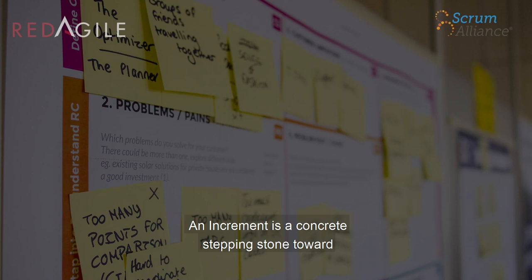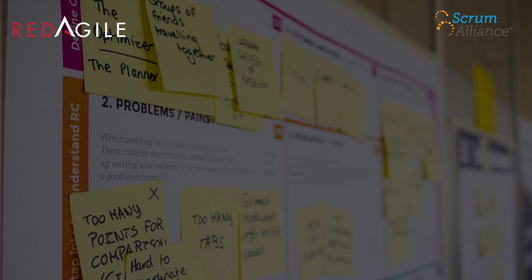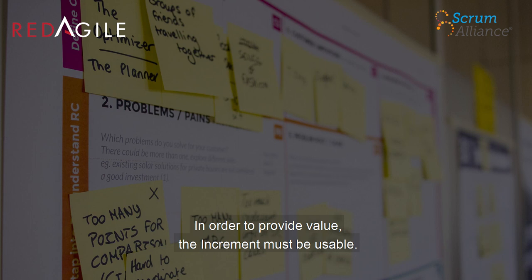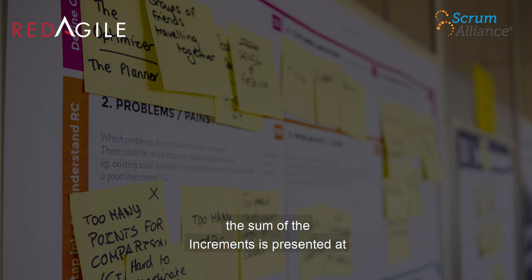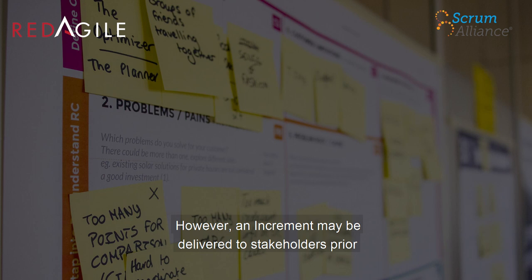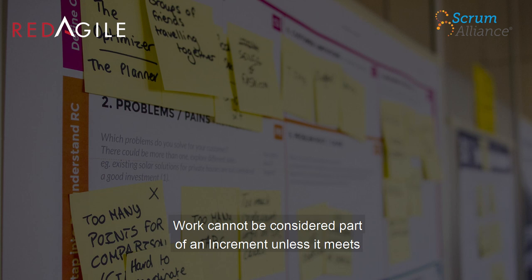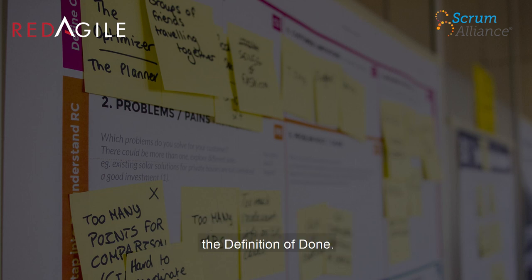Increment. An increment is a concrete stepping stone toward the product goal. Each increment is additive to all prior increments and thoroughly verified, ensuring that all increments work together. In order to provide value, the increment must be usable. Multiple increments may be created within a Sprint. The sum of the increments is presented at the Sprint Review, thus supporting empiricism. However, an increment may be delivered to stakeholders prior to the end of the Sprint. The Sprint Review should never be considered a gate to releasing value. Work cannot be considered part of an increment unless it meets the definition of done.